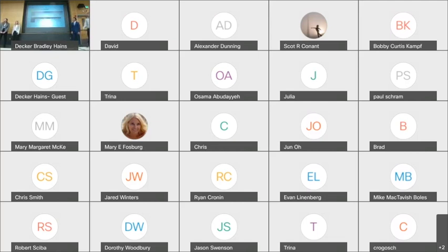Looking at our alternatives, all the costs are put together in the table above, and total on the column to your far right. The total estimate for the public layout comes out to just under $5 million, much higher than the estimation for the private layout being about $2.33 million. But when you factor in how many parcels we're able to put on each layout, the cost per parcel for the public layout ends up being about $12,000 lower per parcel, which brings us to our final decision matrix.